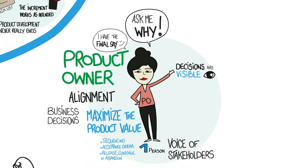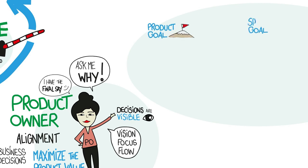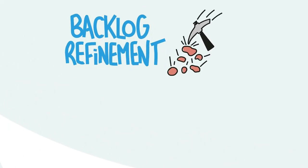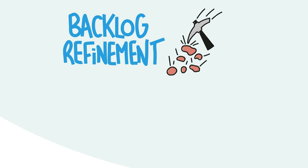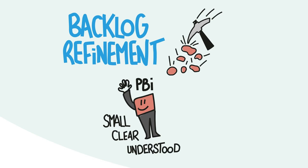Traditionally, the product owner's mission has been summarized in three words: vision, focus, and flow. Scrum represents these concepts through the product goal, the sprint goal, and backlog refinement. Backlog refinement is the process of making the most important backlog items transparent, visible, understood, and small.